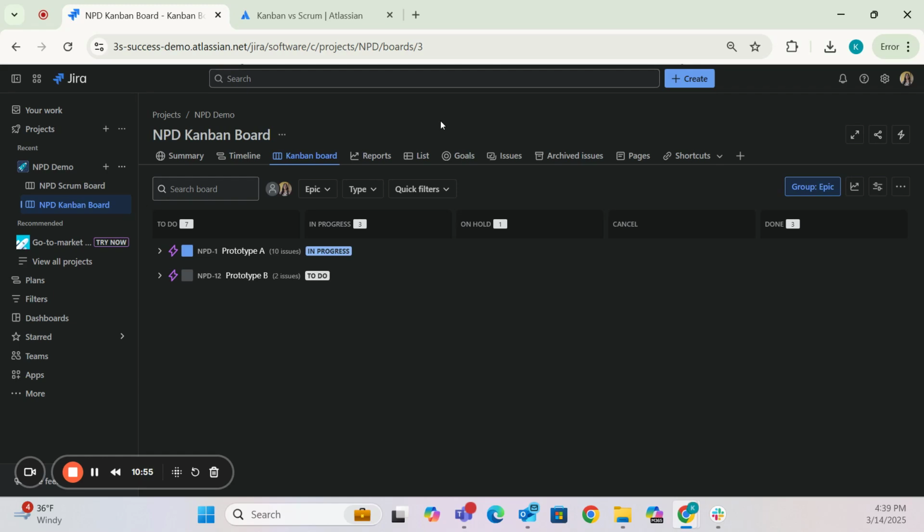And the second question is, do I have a project manager, Scrum Master, or am I willing to go through, hold those sprint planning sessions and backlog grooming sessions so my team can plan out their work 2 weeks, 3 weeks, 4 weeks at a time in a sprint, and I manage the backlog. If you have a project manager or a Scrum Master and you have a fixed deadline for your project, you may also want to lean towards a Scrum board.